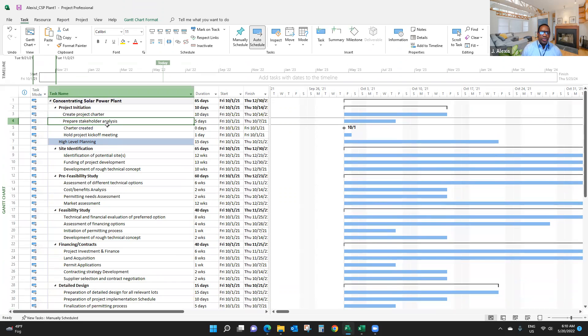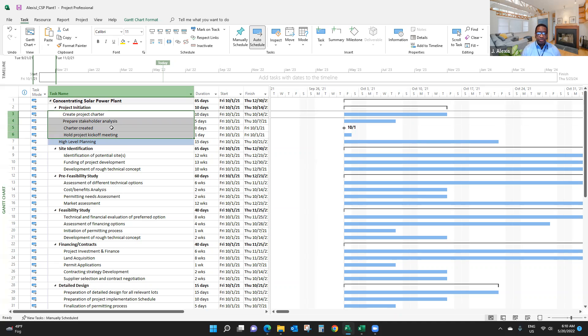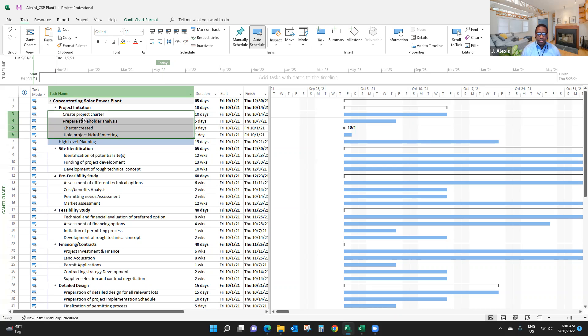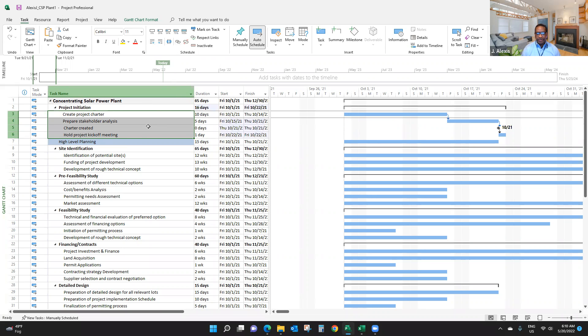What I want to do is link those items under project initiation. Project initiation is a project management deliverable. I select from the first item to the last. This is not all activities. Activities start with a verb. But I have a milestone here - charter created is a milestone. To link them, I just click on link. Here we go. See that?